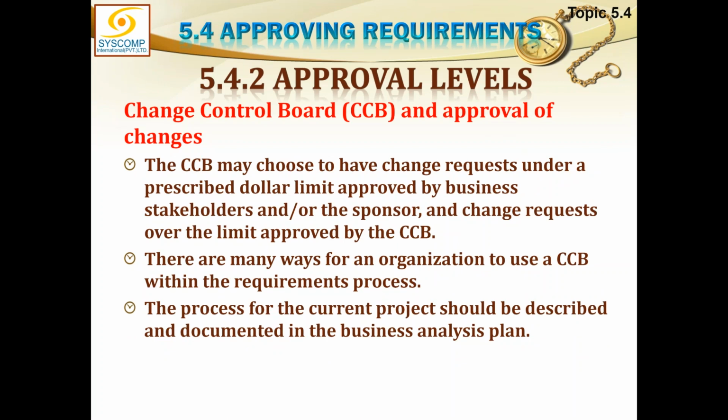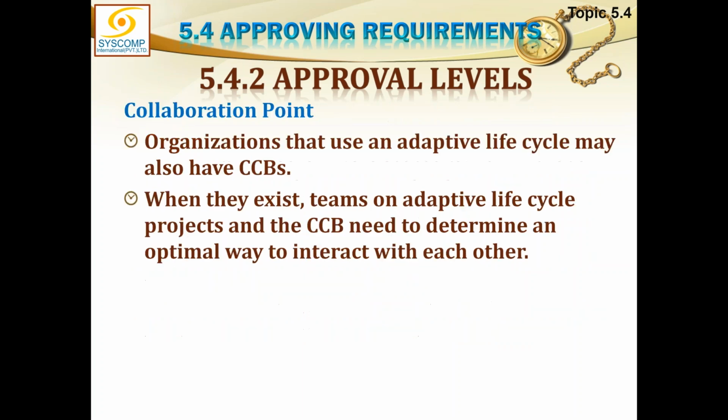The Change Control Board may choose to have change requests under a prescribed dollar limit approved by business stakeholders or sponsors, and change requests over the limit approved by the CCB. So it is very much possible that the Change Control Board delegates some of its responsibilities to the business stakeholders. Otherwise, the CCB takes on the responsibility. There are many ways for one organization to use a change control board within the requirements process. The process for the current project should be described and documented in the business analysis plan.